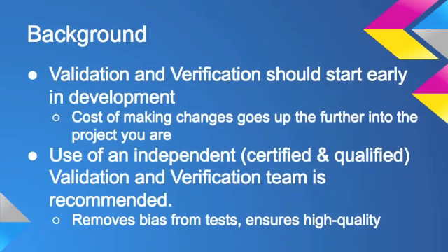Validation and verification should start early in the development phase. The cost of making changes goes up the further into a project you are, so the sooner you start validation and verification, the less likely you'll have to spend more money. Also, the use of an independent validation and verification team is recommended. This removes bias from tests and ensures high-quality products.